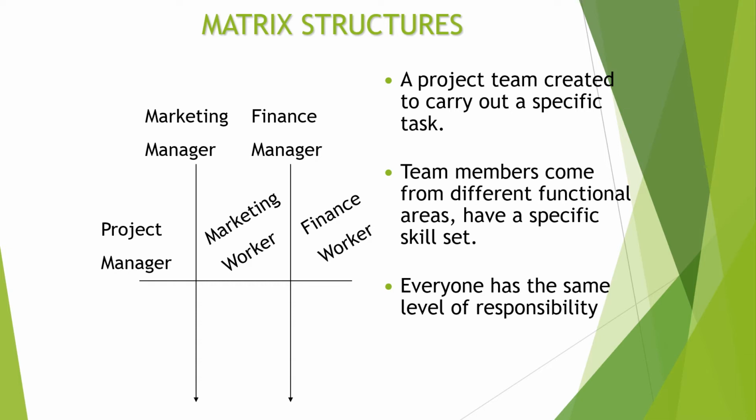Now, in a house building type situation, on a house building site, the site manager is the project manager. What's important to note here is that back at the head office or at the main place of work, the employee will also have a boss. So on the site, the employee will be responsible to the project manager, but overall they will be responsible to the sales manager if they're the salesperson, or the technical manager if they're the surveyor or the engineer or whatever back at head office. So these people will have two structures.